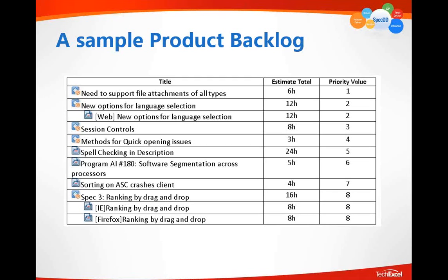So here is a sample product backlog. Very simple. It's the story, it's the task. Sometimes a standalone task representing a defect or whatever does not have a parent requirement spec linked. It just represents a standalone task. So whether it's a standalone task or a story, often you're going to do the estimated time, really the estimated points, and also you're going to prioritize them.